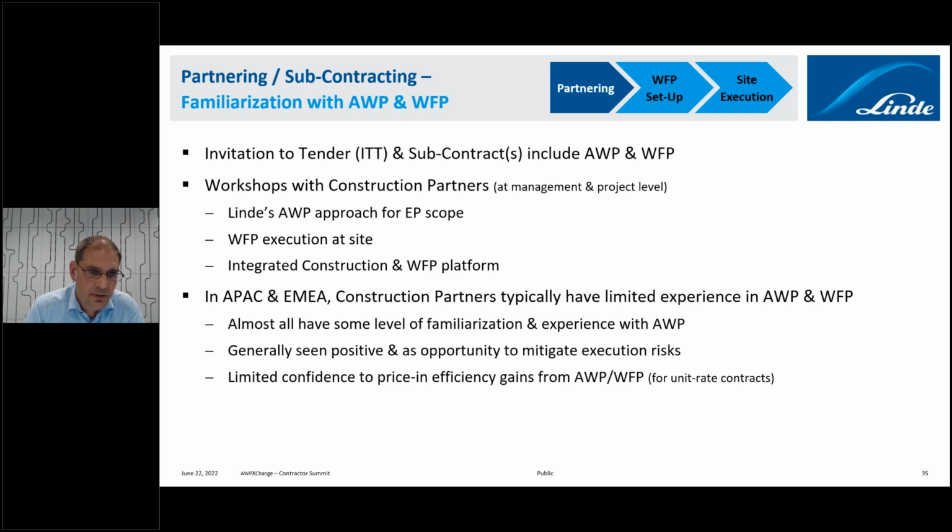So we explain our approach, and we also explain the integrated construction work phase planning platform. So this means for Linde, we have a so-called construction management system, which is the material warehouse, welding and mechanical completion system, which is closely interlinked with O3. So we have built various automated APIs in between. So this is kind of one integrated platform now.